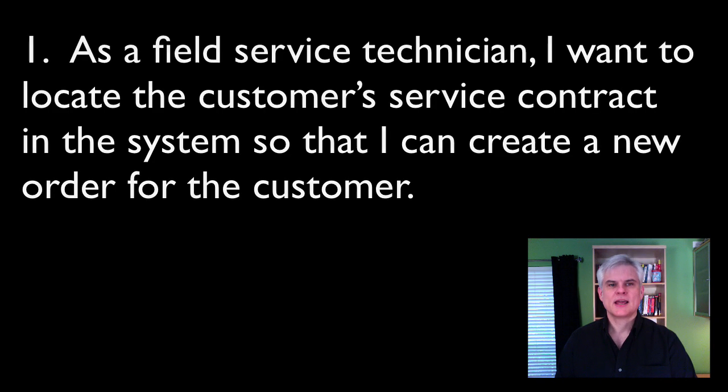So let's pretend for now that we work with the stakeholders to capture a few very basic user stories. We can add, and we will add, many more throughout the course of this project as new details emerge about the proposed system. But let's look at the first, most basic user story that we can possibly come up with. So here it is. As a field service technician, I want to locate the customer service contract in the system so I can create a new order for the customer.